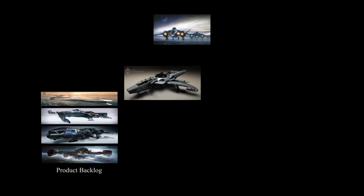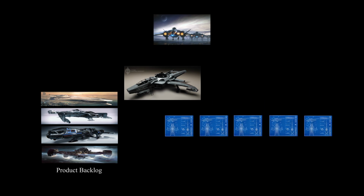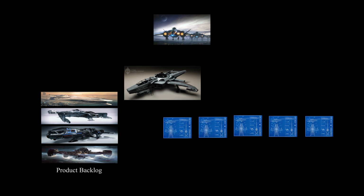A storyboard can be created that explains what the ship is and what it can do, basically the requirements. Then the epic is broken up into even smaller bits of work. There might even be epics in epics, it just depends on the complexity of the work. Then they have these development cycles called sprints. Sprints can be 1 to 4 weeks in length and are basically the incremental product release cycle. This might not translate into, say, a 3.3 release, as they will have several sprint cycles before the product release.